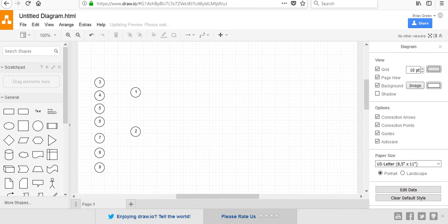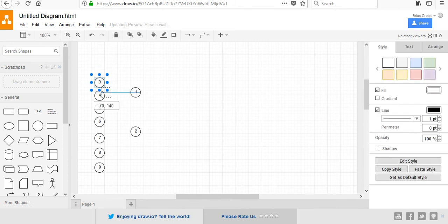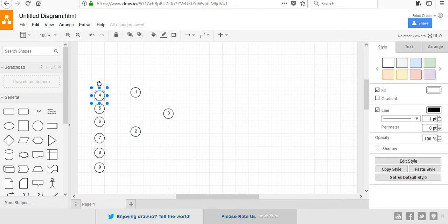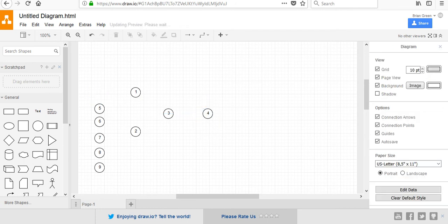All right, so the next task on my list is getting funding approval. In order to get funding approval, do I have to decide on what I'm getting? I would say the answer is yes, because I can't get funding approval if I don't know how much I need, right? I need to know how much money I'm going to need to get approval for. I can't just give them an estimate. But once I get my funding approved, then chances are I can start ordering this stuff. So that leads me to task 4, which is placing my order.